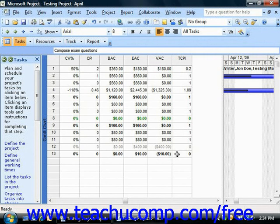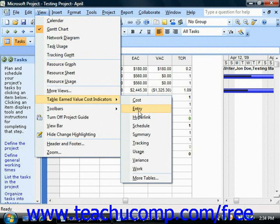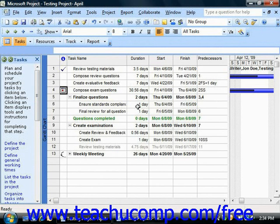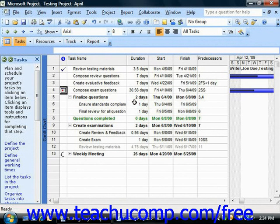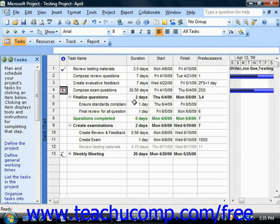For users of Microsoft Office Project 2007 who also have Microsoft Excel 2003 or later installed, you can create a new visual earned value over time report — one of the new Excel reports available within Project. This report shows a standard S-curve line chart that traces the cumulative values of three key indicators over time: the actual cost of work performed (AC), the budgeted cost of work scheduled (planned value), and the budgeted cost of work performed (earned value). If you're using a version of Project prior to 2007, you can still generate a similar report using the Analyze Time Scaled Data add-in available within Excel.